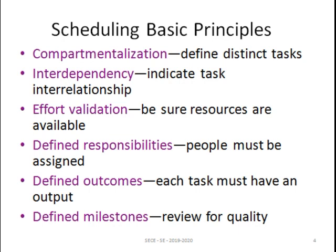If you know the relationship between tasks, your work will be minimized. The third principle is effort validation — it makes sure that resources are available for each and every task. A person or group of persons will be allocated to complete the task. We validate effort by checking whether all the resources are utilized by the resource persons. The next principle is defined responsibilities — the people assigned for the task have some responsibilities.